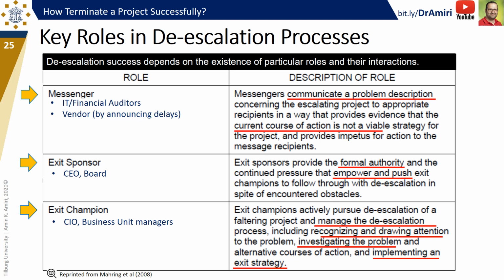Finally, the most important key role in the de-escalation process is exit champion. These are people who are in charge of managing the termination process from recognition to exit strategy. CIO or business unit managers can play this role. At IVK, the CIO, Jim Barton, took this role.